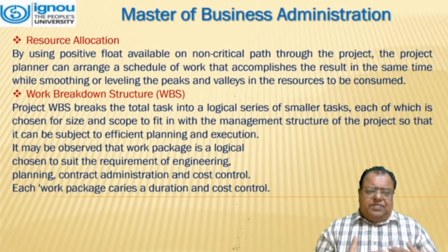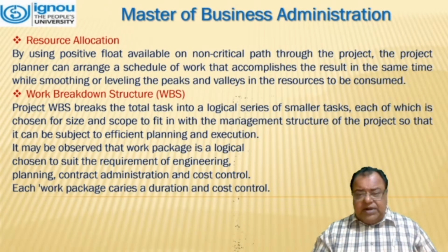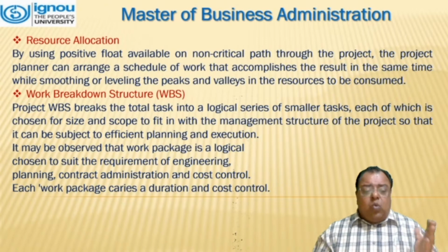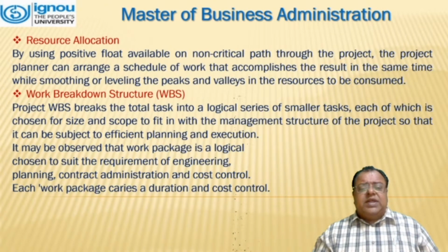Resource allocation: by using positive float available on non-critical paths through the project, the planner can arrange a schedule of work that accomplishes the result in the same time while smoothing or leveling the peaks and valleys in the resources to be consumed.